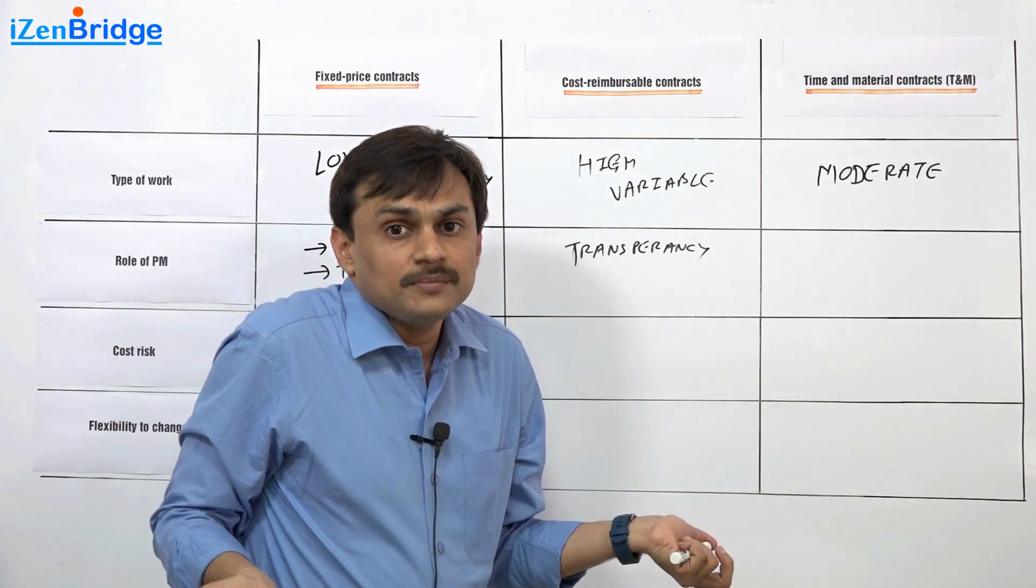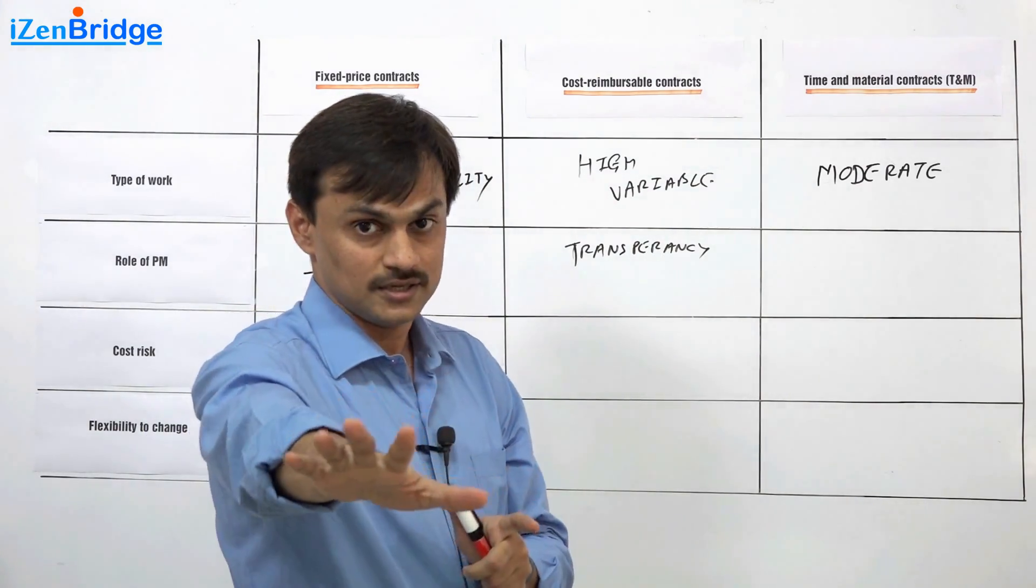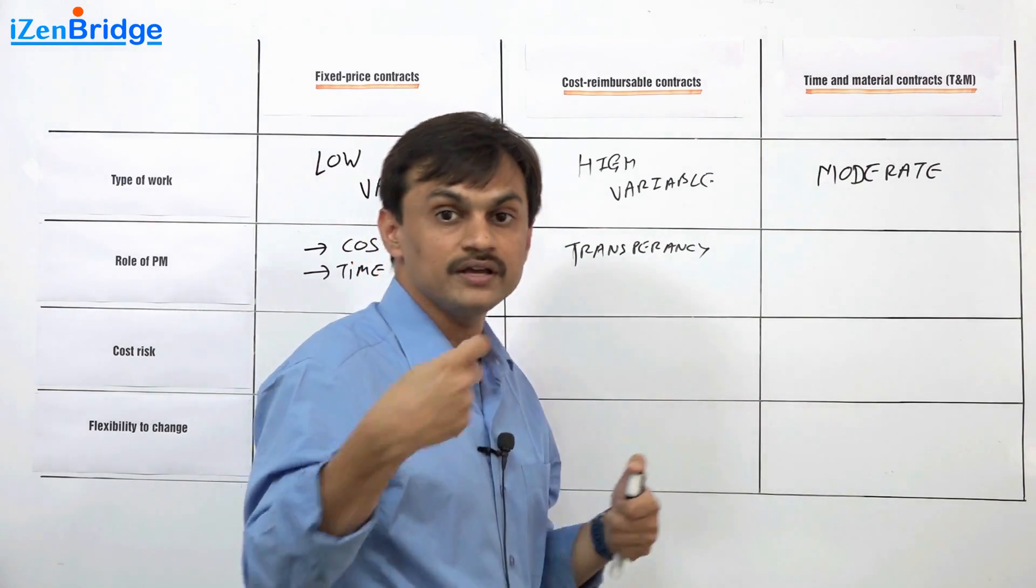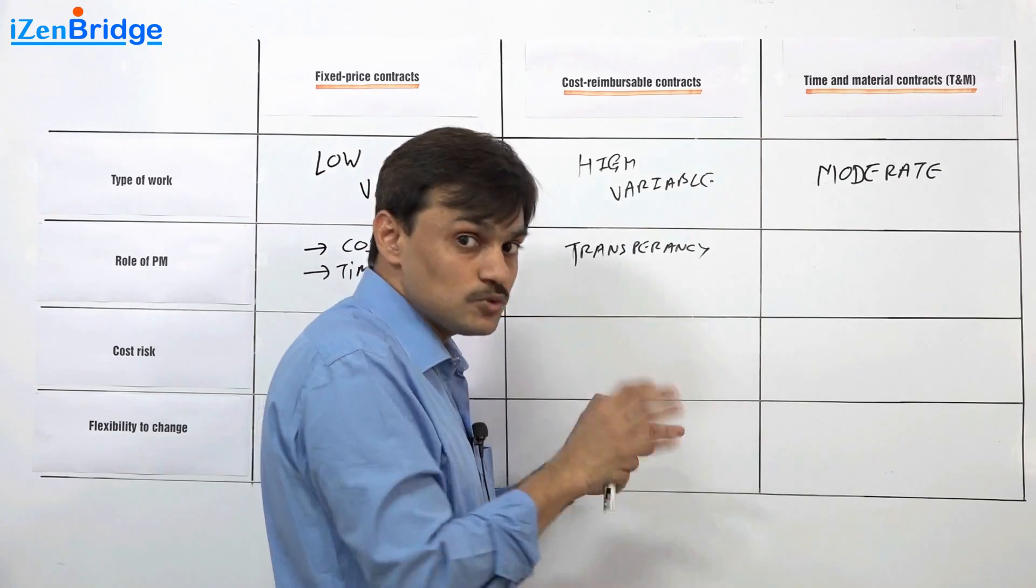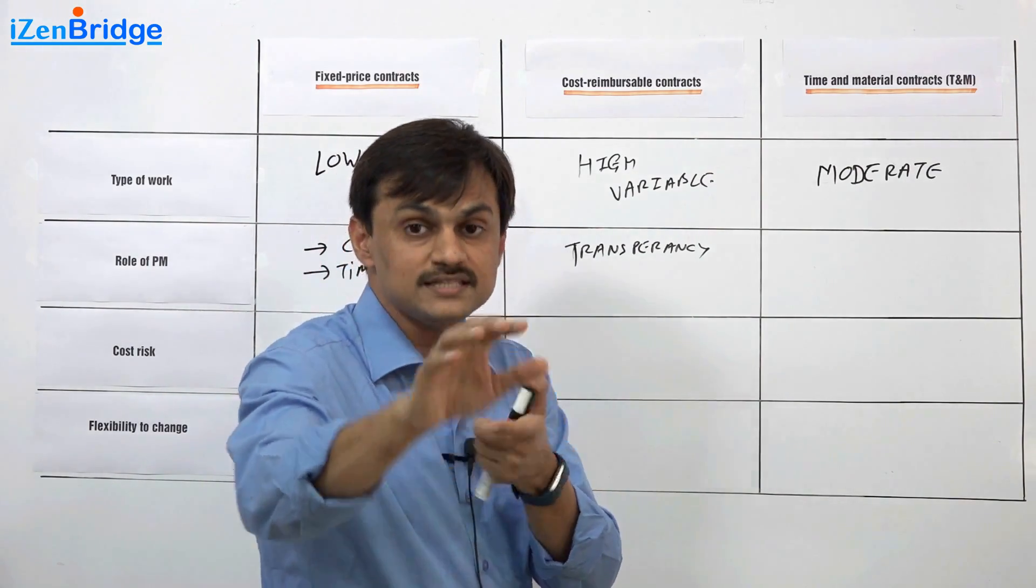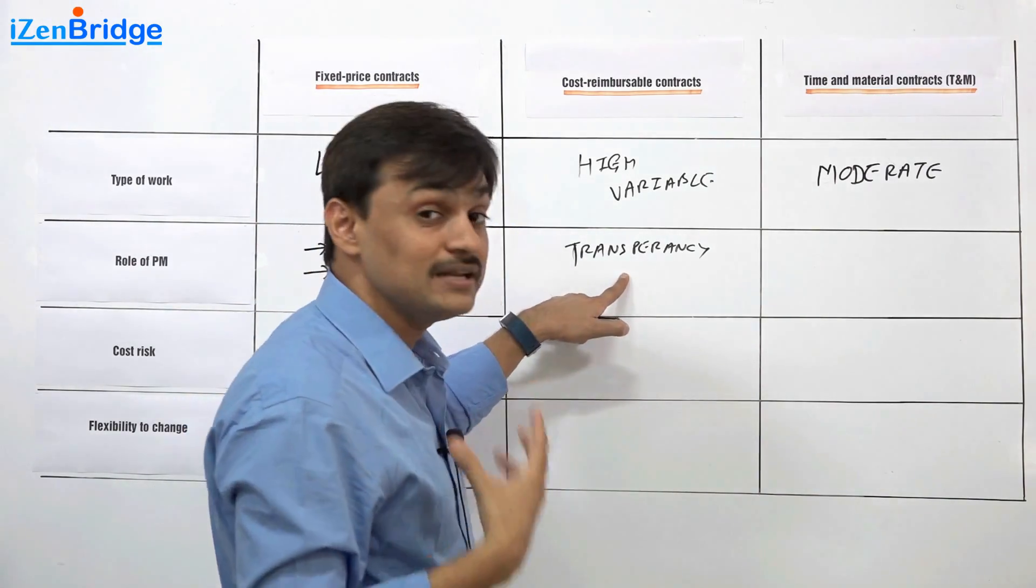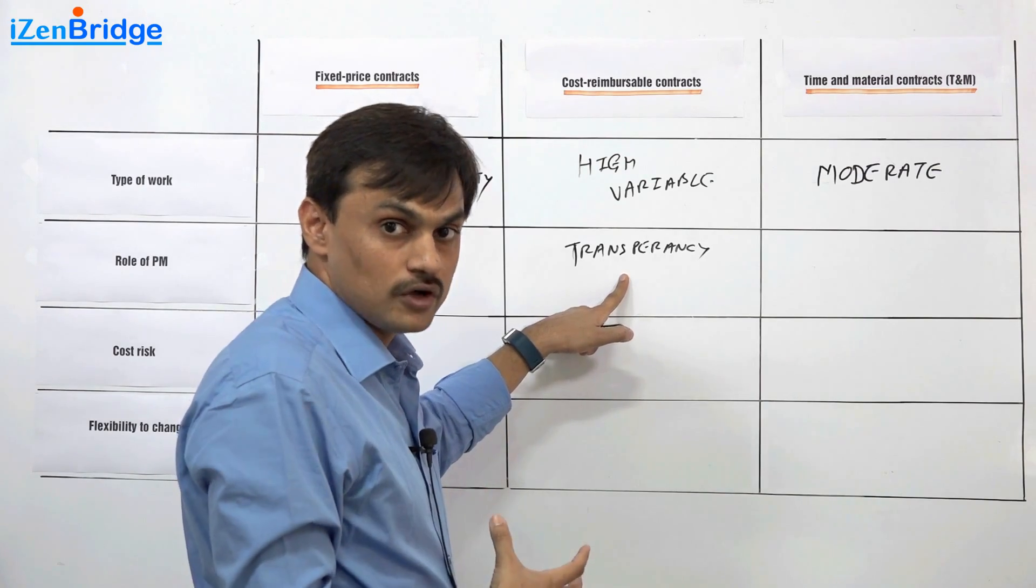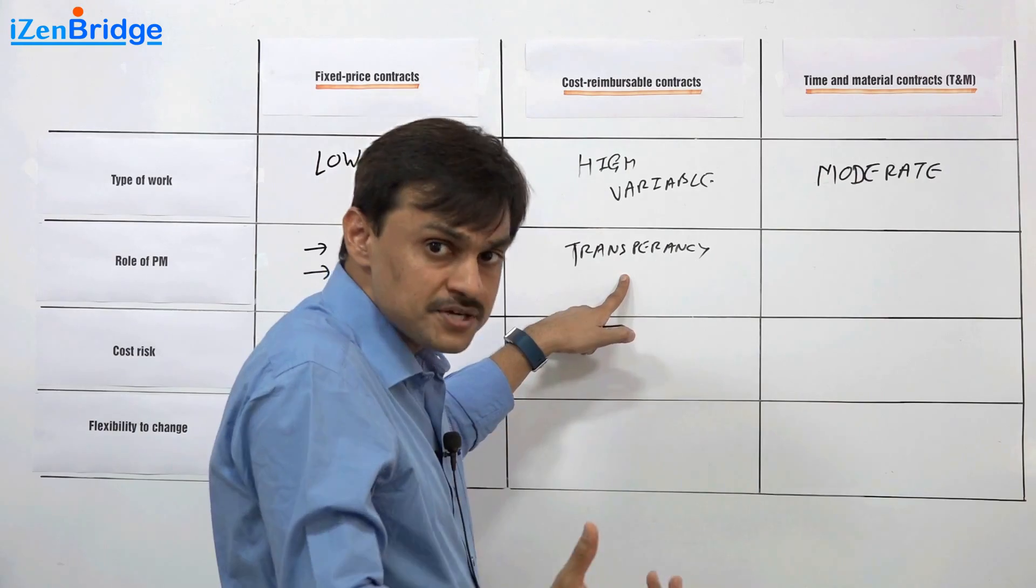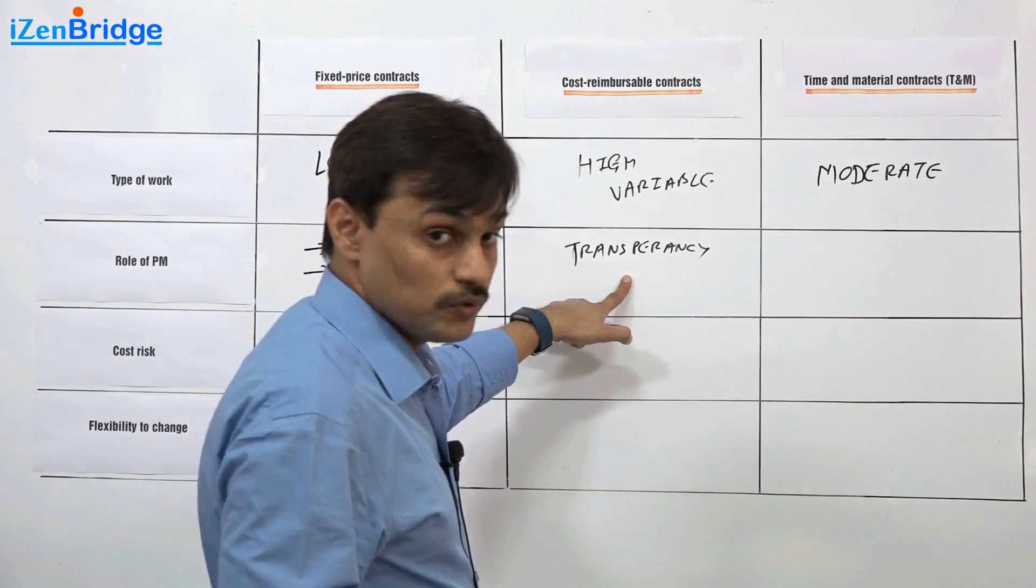If something is taking extra money, project manager has to just ensure the buyer knows about it. That's it. He has not to make a decision. He just needs to project that information to a buyer that yes, this is going beyond cost estimated, this is going like this, and buyer keeps making all the decisions. Buyer is primarily responsible for managing cost and time in case of cost reimbursable. As a seller, you give all the options and you make sure that all the decisions are made after taking an approval from buyer.